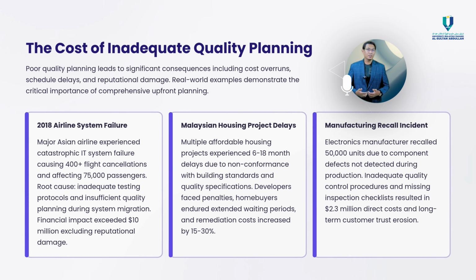Now, consequences of inadequate quality planning. When quality planning is overlooked, the consequences can be severe. One example occurred in 2018 when a major airline experienced a global check-in system failure on the day of the launch. Flights were delayed, passengers were stranded, and the company suffered reputational damage. An internal investigation revealed inadequate quality planning, including incomplete testing and no contingency measures.